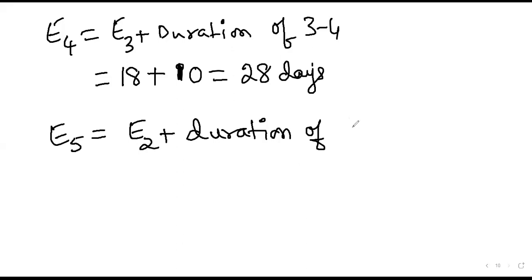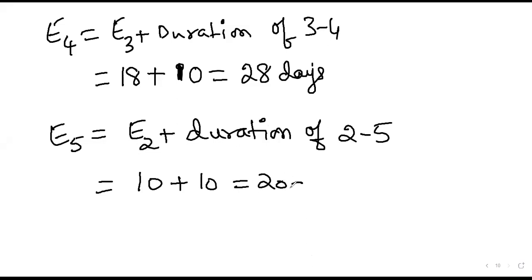Is everyone following this solution? Yes, sir. E2 is 10. Duration of 2-5 is how much? 10. So it will be equal to 20 days.